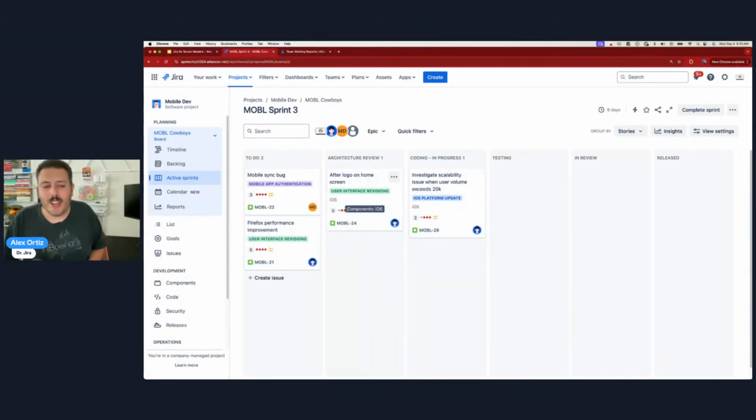But when you're in one of these other statuses, it's very important, because if something has been in this architecture review for 16 days, well, now you as a Scrum Master, this becomes your to-do list, right? Because now your job is to go figure out why this is stuck in architecture. You talk to Alana, you talk to the architecture review board, and you're trying to figure out, are they out on vacation? Are they like our Congress that goes on recess every 15 minutes, right? You've got to figure out what's going on. Why is this thing stuck? Our sprints are 14 business days, 10 work days. And so something being stuck in it for 16 days is a red flag, right? And so these little dots are going to give us that information to be able to follow up.